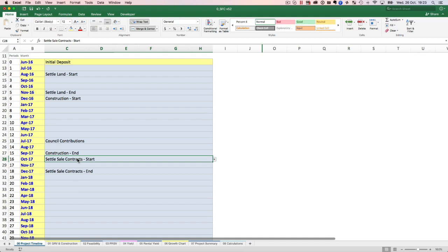In Victoria we do that, but the project that I did in Brisbane, my lender was Westpac, and Westpac didn't allow me to apply for these titles before I got the occupancy permit. So in Brisbane, what happened was we waited until I got the occupancy permit and the project was handed over to us, and then we went back to Westpac and said, look, here is the occupancy permit. Here are the forms that you need us to fill out. Can you give us consent to be able to apply for the titles?